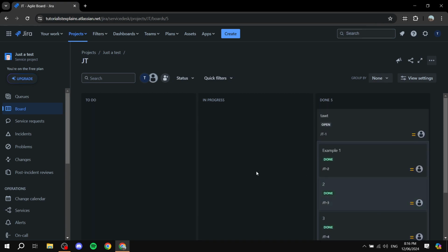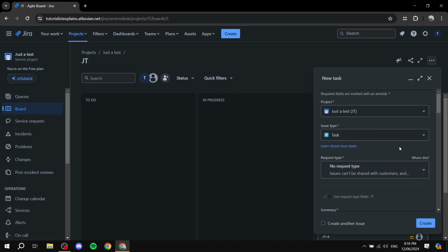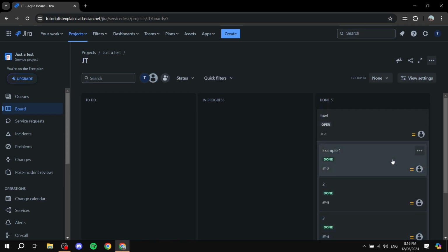So this is pretty much how to use subtasks in Jira. You can't really create them out of thin air. They need to have a parent task in order to use them. And with that, you can create multiple types of subtasks and assign them to different people, and when all of them are done, this parent task should be moved by itself. If it's a Kanban view, it's just going to give us a better view of the entire task and how much progress has been done for that specific one.